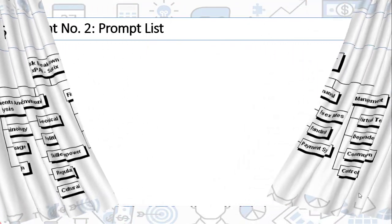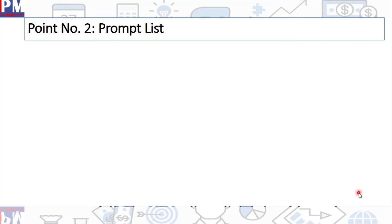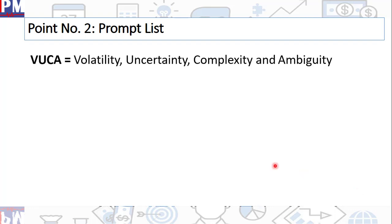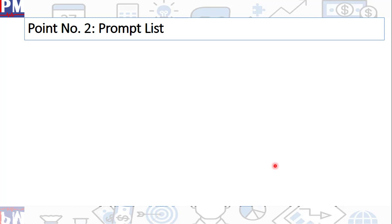Let's move on to point number two. Prompt list is another thing. For some reason, many candidates just don't get it. Unfortunately, there are a lot of books and trainers, particularly on Udemy. So when we talk about prompt list, one of them is VUCA. But before I talk about VUCA, let me go back. What is a prompt list? Prompt list is basically certain industries have some ready-made categories of risks.